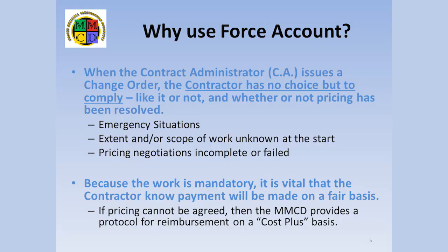The MMCD made it mandatory for a contractor to comply with an order from the CA. The contractor does not have the discretion to refuse or delay, whether or not in agreement with the work or its pricing. As a result, we wanted to ensure that the contractor had every confidence payment would be made for work beyond that called for in the contract. While we hope the two parties will be able to negotiate the additional cost, we realize that a fallback position had to be provided in case negotiations failed.